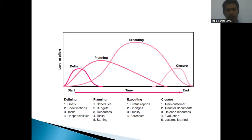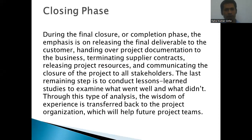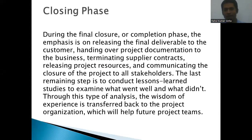This is the end stage of the closing phase. During the final closure or completion phase, the emphasis is on releasing the final deliverable to the customer, handing over project documentation to the business, terminating supplier contracts, releasing project resources, and communicating the closure of the project to all stakeholders. Finally, your project is at the end stage or completion stage, and here you will close the project.